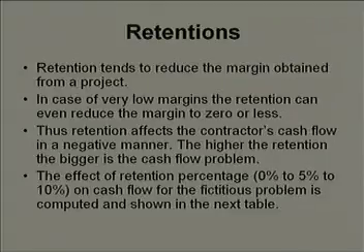That means whatever billing you have done, all money will be made available to you, but after a gap of 1 month, because we have assumed that the client takes 1 month to release the payment. Now, in the last case, I will assume that retention percentage is 10. That means clients will keep 10% of 110 from every bill starting from month 1. So, this gets repeated for 10 months.